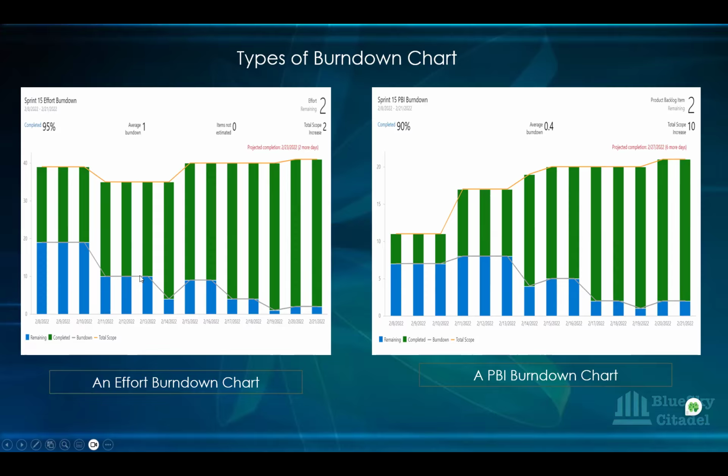But if everybody says, oh yeah, work is going on well, I'm progressing well, things like that, then you can look at this and be able to say, but for the past 2 days we've not closed any of the stories. Is there any impediment? Is there anything causing delay? And then you can see that it went down, and then again after 2 days, nothing. And this shows you that after it went down here, there was a scope increase. That's why it went up here again.